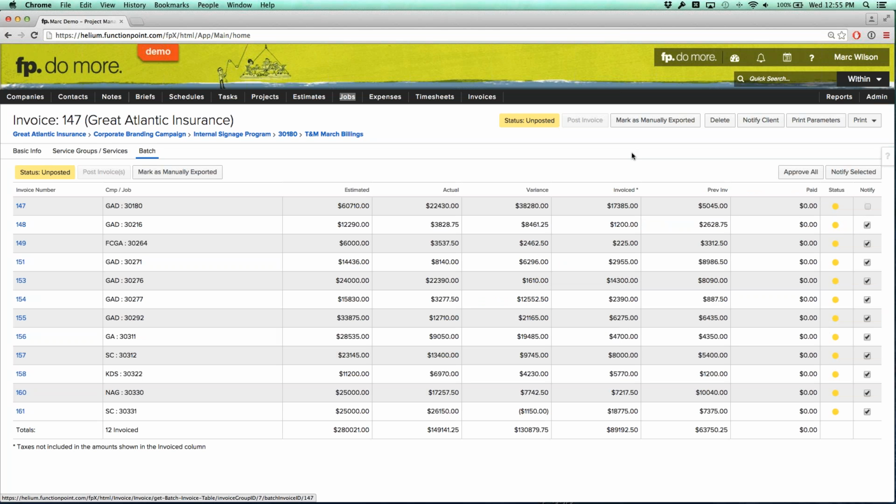So this is an example of if you put in the category, and if your active list is accurate, then you can pull up all your time and materials jobs and bill them all at one time and have them all sent out to the client pretty easily, with only a little bit of manual manipulation done to make sure you don't end up with any 0 value invoices. Because I see that from time to time, pretty rare, but every once in a while, and that's not really something that you want in your system. Not really a huge impact, to be honest with you, but just for general system cleanliness, you don't really want 0 value invoices in there.